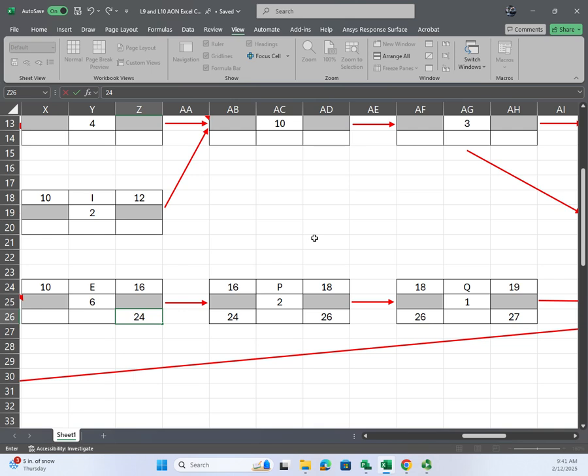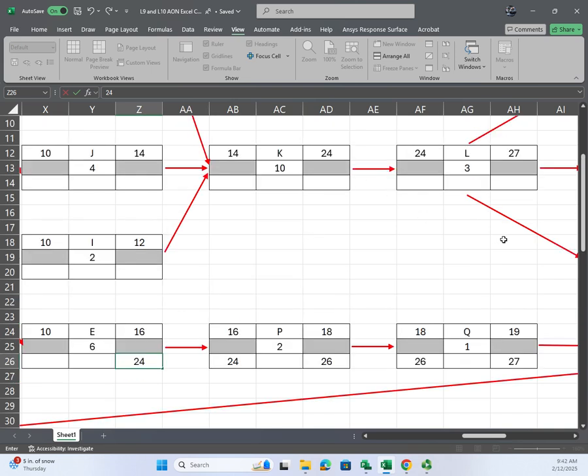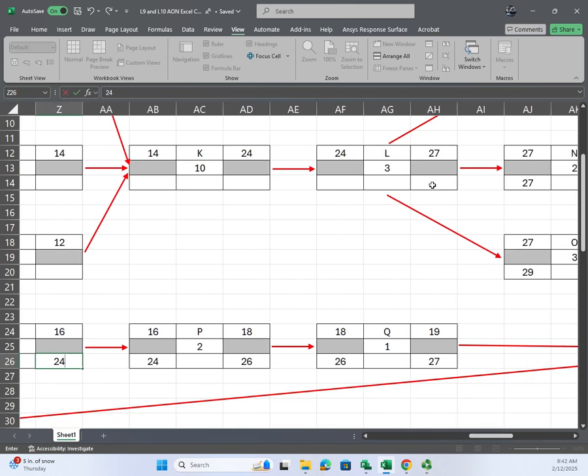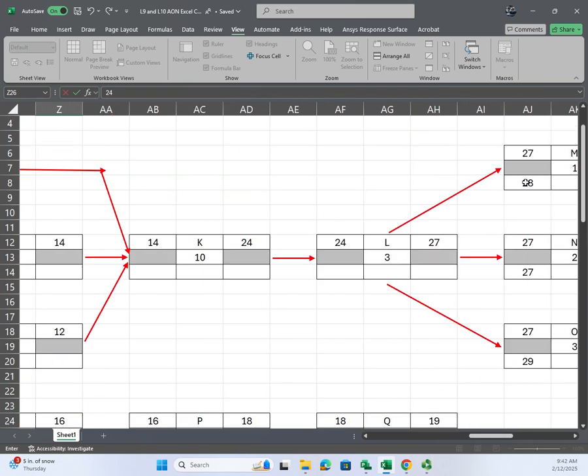Everybody so far caught up, got your numbers? Alright, now let's go up and play with this stuff up above here. So this one has got to be 29, 27, 28. So 29. Okay. 29 minus 3 is 26. 26 carries over to here. This becomes 16. And we're so far so good.